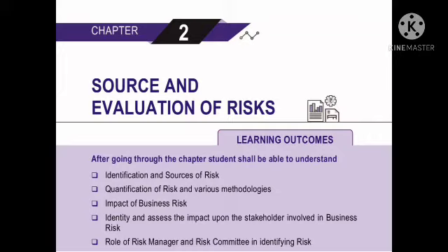The risk identification process usually leads to the perform qualitative risk analysis process, or it can lead directly to the perform quantitative risk analysis process when conducted by an experienced risk manager. The objective of risk identification is the early and continuous identification of events that, if they occur, will have negative impacts on the project's ability to achieve performance or capability outcome goals. They may come from within the project or from external sources.